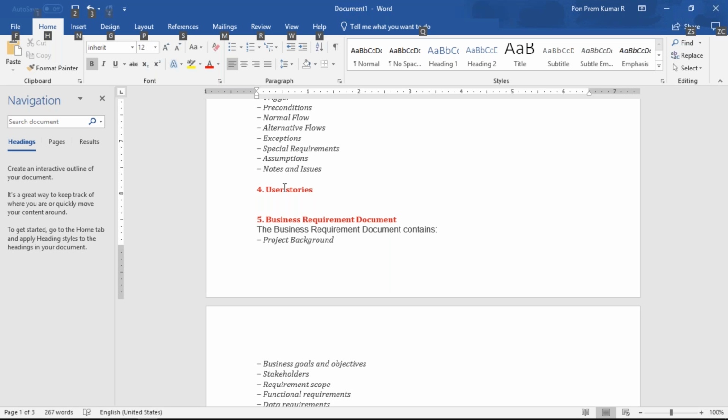Anything less than 8 is a very small user story. One developer is capable of handling story point value up to 19. In a single sprint, one developer can handle 19 story points. According to that, the project management team calculates and assigns work to both the BA and the development team.